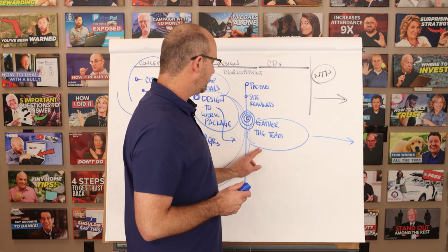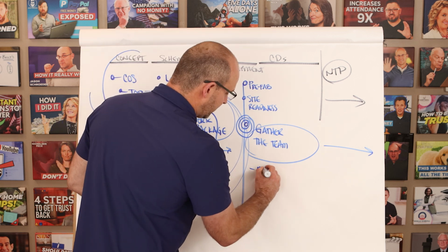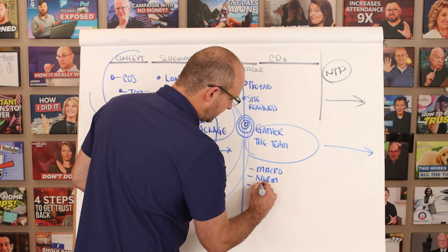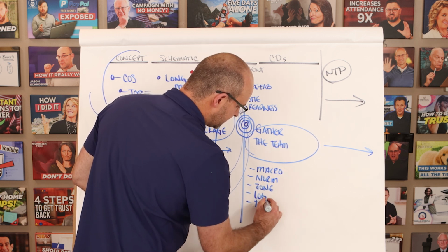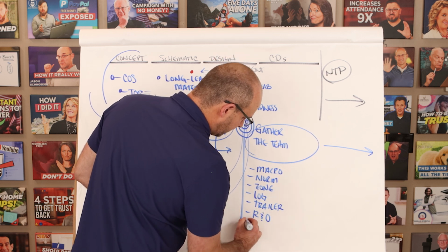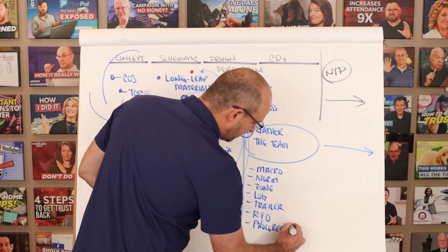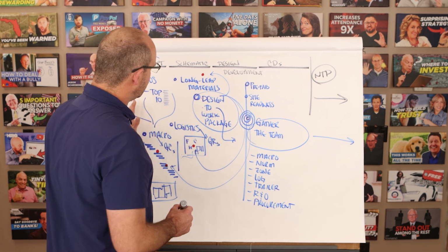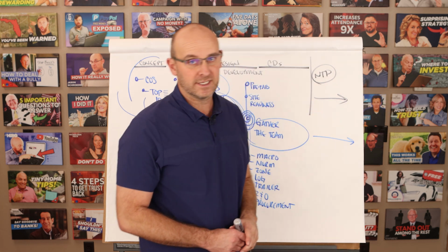So we definitely want to gather the team here and make sure that they're starting to take on the macro level TAC plan, that they're starting to create the norm with trade partners, that they're updating the zoning, that they're updating the logistics, that they're designing the trailer for the project, that they're doing the risk and opportunity register, that they're now managing the procurement systems, right? And if your team isn't on board, then somebody inside the company in pre-con needs to be doing this to properly set up the first planners so we can properly set up the last planners.